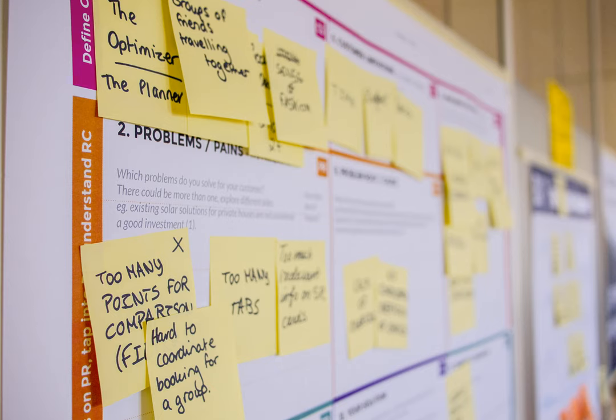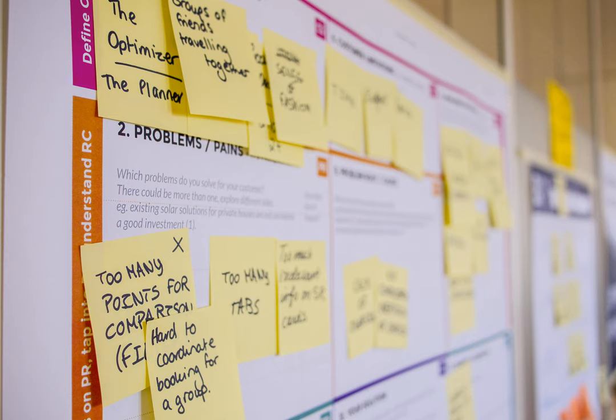At the next sprint retrospective, the team should ask themselves, why were our estimates off this sprint? Was there anything we should have done differently? What can the team do differently next time? Why wasn't at risk work flagged, escalated, communicated earlier in the sprint? Was the sprint goal at risk? If so, why didn't the product owner know before the sprint review? If the product owner knew, why weren't the stakeholders informed?